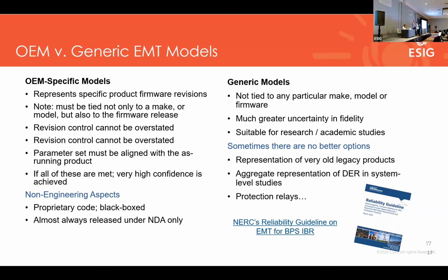Because if you have a request for a model and it takes the legal team 4 weeks to get the NDAs in place just to have access to the model, that is going to become extremely painful as we really start doing this in more volume. Today, the industry maybe has kind of gotten away with that and said, okay, get this process started because it takes a long time, but that's going to become increasingly painful. So there are some non-engineering aspects that have real implications on getting the work done and the timelines associated with all of this stuff.